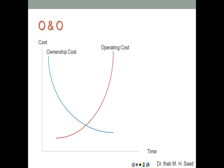Graphically, ownership costs go down with time due to depreciation, whereas operating costs go up with time. The older the equipment, the more operating costs it will have — more maintenance, more repairs. The ownership cost keeps declining until it becomes, at least on the books, zero. You might still have the equipment functioning and producing, in which case the ownership cost becomes essentially nothing.